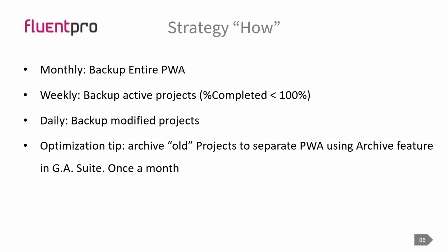They just consume the space, they impact the performance, but you really won't report on any of those projects because the data is outdated. You keep it for records, you keep it for traceability. Maybe there are some legal requirements to keep that. Maybe you track it for lessons learned, but it's not something that you want to use every single day. What we recommend, we have a feature where you can move those projects. You can provision a new PWA, and you can move projects from your production PWA to that archival PWA.